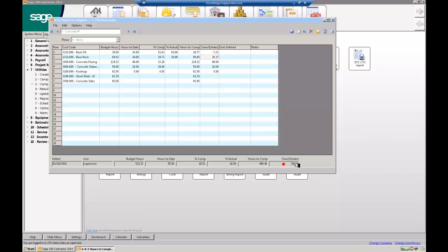And in the very far right-hand corner at the bottom, how many hours I'm going to be over or under on this project, and when it's all said and done, based on the percent completes that we have as of this minute. So, great tool for project managers to use. The great thing is they can't do anything other than enter in here. This information really doesn't go anywhere, so it's not impacting accounting or financials. It's more for them to have a picture and see how well they are doing against the target.